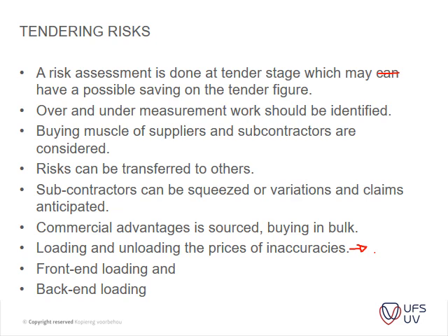Okay, front-end loading, that was what I was talking about just now, where you actually load your items at the front of your project, for instance, your excavations, your concrete work, and so on.